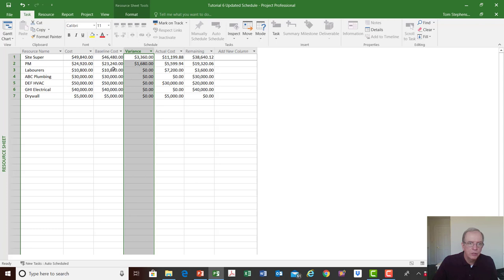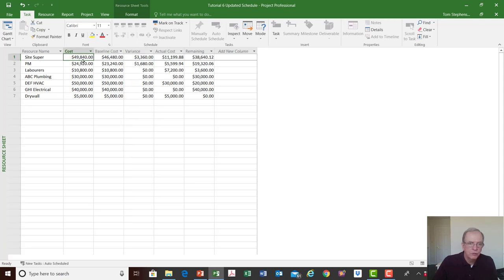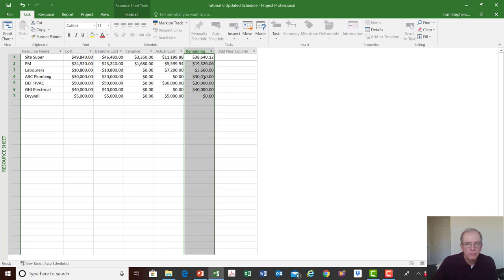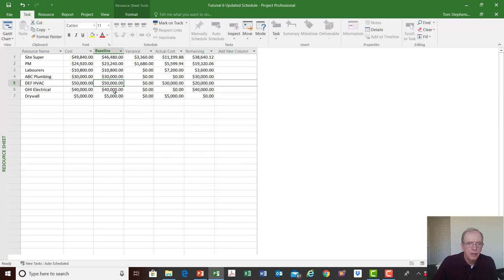Your budget would have been your baseline cost, and now that the project is running longer it's costing more. You'll also see actual costs incurred up to that point by individual resources, based on how you structured them — we talked about that in tutorial four. This shows the remaining work left to be done and the costing for it based on what you originally entered in the baseline schedule.